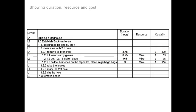The level fours are then totaled to give a duration and cost for the third level deliverables. The same is then done for the other deliverables so that you have a total cost and duration for the project you are proposing to execute.